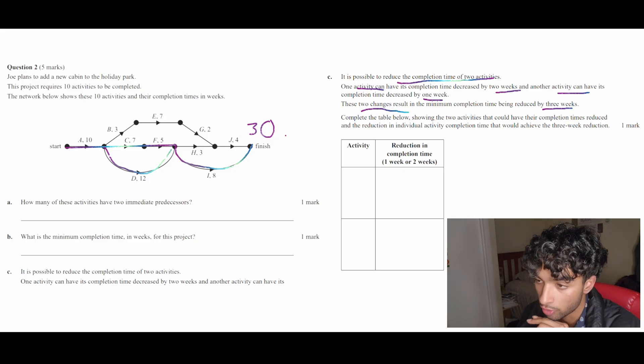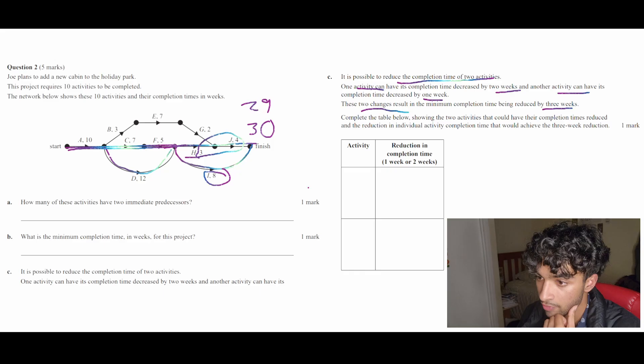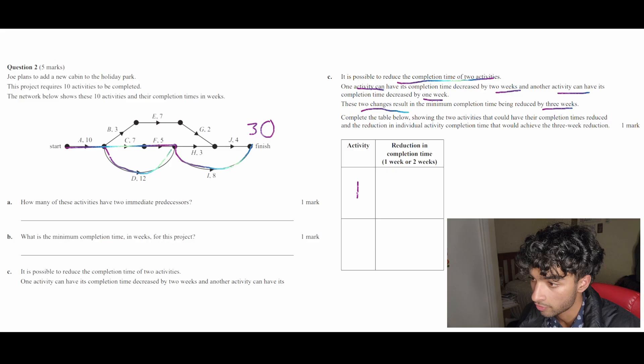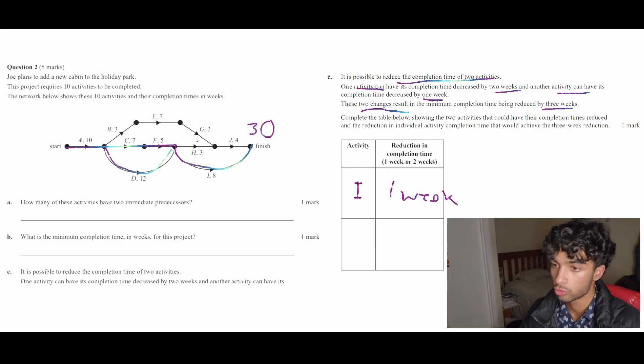But if we look at the next longest, it's just straight here and that is 29. So as we can see, the difference here is 8, whereas going straight left is 7. So if we reduce I to 7, which is a reduction of one week, then we can reduce the overall critical path or the overall minimum completion time to 29. So that means we do activity I and that will be a one week reduction. And then what else can we do to reduce this overall completion time?